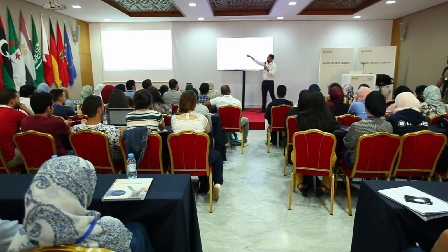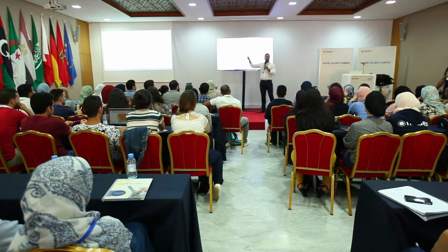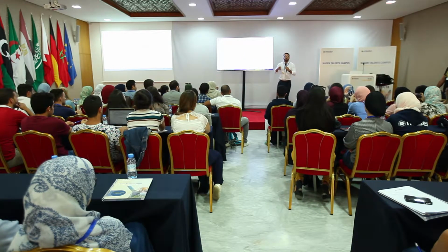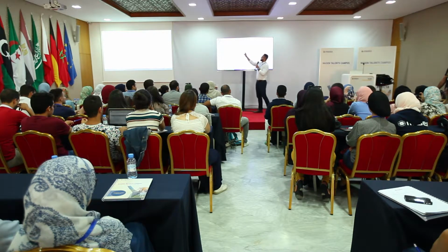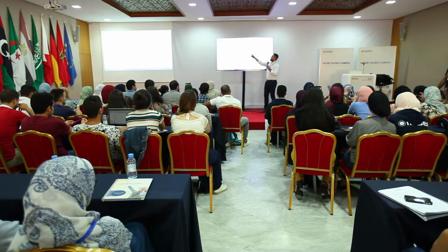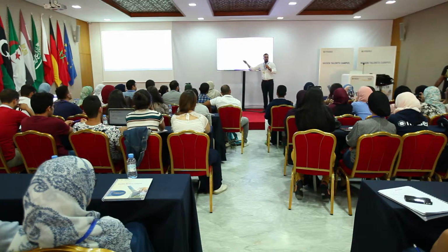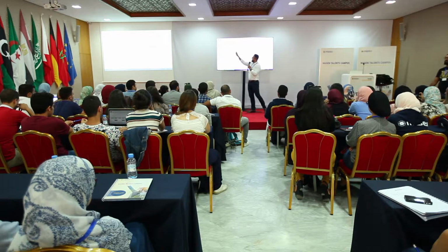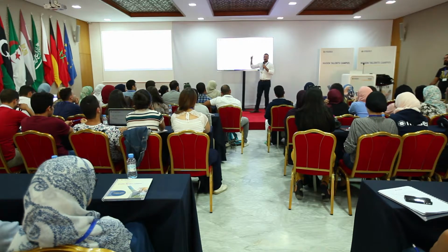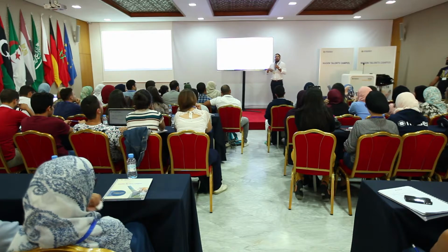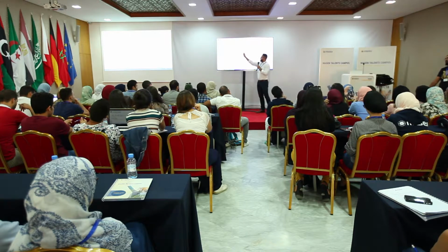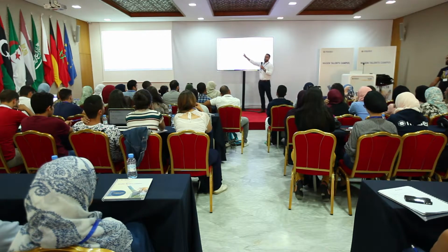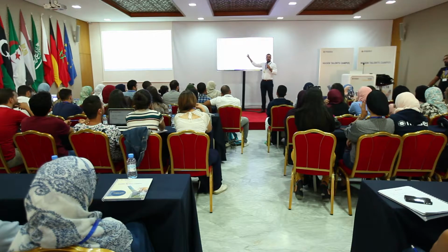But the PPA is the one that, when you put in all the different debt mechanisms, where the money comes from, the different debt conditions and so on, tells you this is the price, and this is the way the price scales. Like year 1, it could be 100, but year 2, because of inflation, you pay 102. Year 3, you pay 104, etc. This is the price that you need to bid for, usually. What you're asked as a proposal offer is what is your bidding price. So from a project proposal perspective, if you are the project company, you put in a bid such that it can guarantee the investment or the profit requirements that are acceptable for everyone putting money in the project.